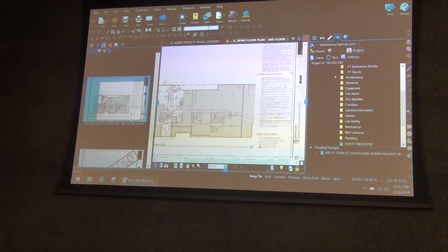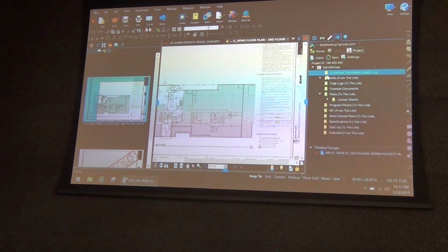It creates standard folders during that process and syncs that data from SharePoint into the Studio project for us. It will also build the daily logs, so they don't have to enter their name and job number. They can just check it out, update their daily log for the day, and check it back in. Same for the short interval plans. They can do their 2-week look-ahead planning as well.